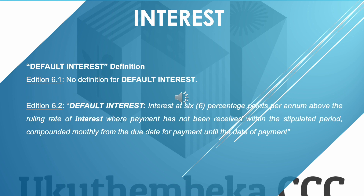Edition 6.1 does not include a definition for default interest or deal with it at all. The Edition 6.2 definition reads: 'interest at six percentage points per annum above the ruling rate of interest, where payment has not been received within the stipulated period, compounded monthly from the due date for payment until the date of payment.' The ruling rate of interest refers to the central or reserve bank rate of the country.